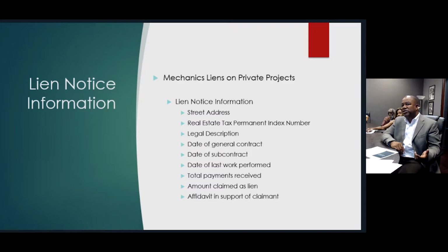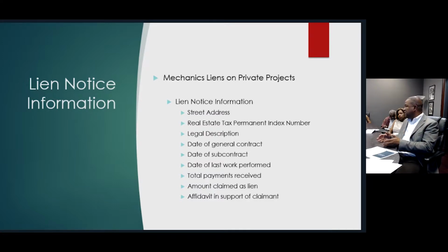But you must have the street address of the project. I want to point out you should get a formal verification of what that street address is. Oftentimes, we may think an address is one thing, but the government may have it at a different address. In order to get the correct address, again, I would look for the assessor, the tax record. I look for some sort of record from the recorder of deeds to see what that exact address is. It is that particular, and you don't want to lose out on being able to file suit because of some technical mistake that you've made in the filing of your notice.